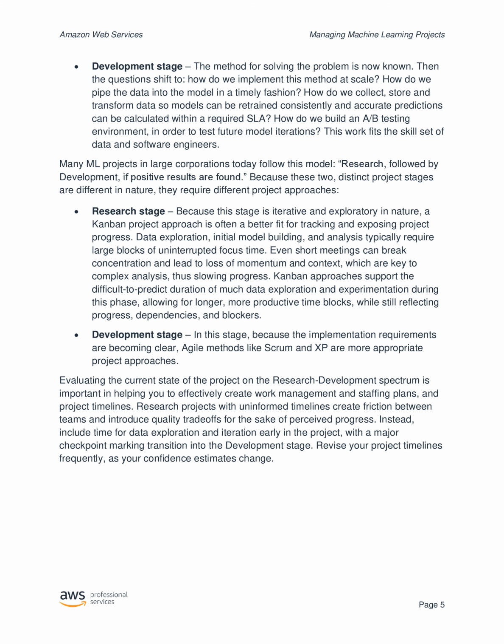Many ML projects in large corporations today follow this model: research, followed by development, if positive results are found. Because these two distinct project stages are different in nature, they require different project approaches. Research stage: because this stage is iterative and exploratory in nature, a Kanban project approach is often a better fit for tracking and exposing project progress.